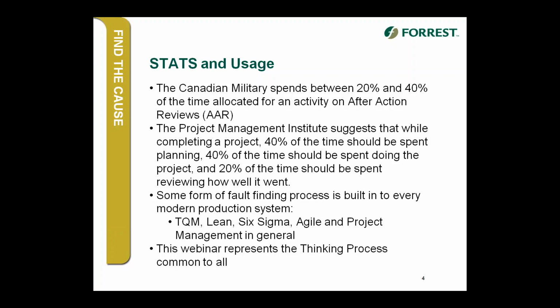The Project Management Institute, the PMI, the sort of cornerstone organization for setting the standard for project management, has suggested in some of their training programs that 40% of the time on a project should be spent in planning, 40% should be spent actually doing the activity, and at least 20% should be spent, not necessarily at the end, but throughout the whole project process, identifying exactly what is going off track if it is, and seeing if they can fix it in time, or at the end, learning what they can learn in order to enhance their project management for the next time around.